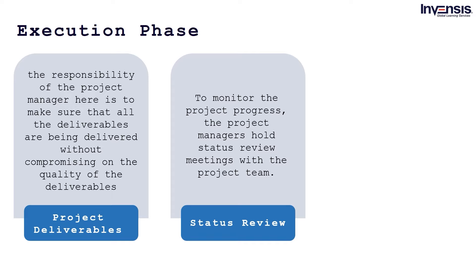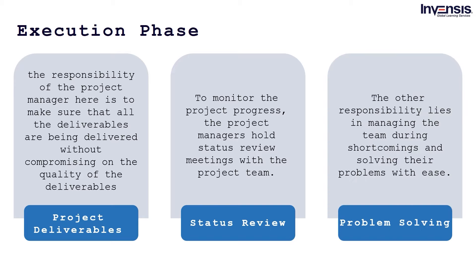The first objective in the execution phase is to get all the deliverables completed in due time. The project manager must make sure that all deliverables are being delivered without compromising on quality. To monitor project progress, project managers hold status review meetings with the project team — for example, a daily stand-up meeting that ensures timely updates on the status of work done. The project manager also manages the team during shortcomings and implements any contingency plans to ensure the project does not jeopardize overall progress before delivery.